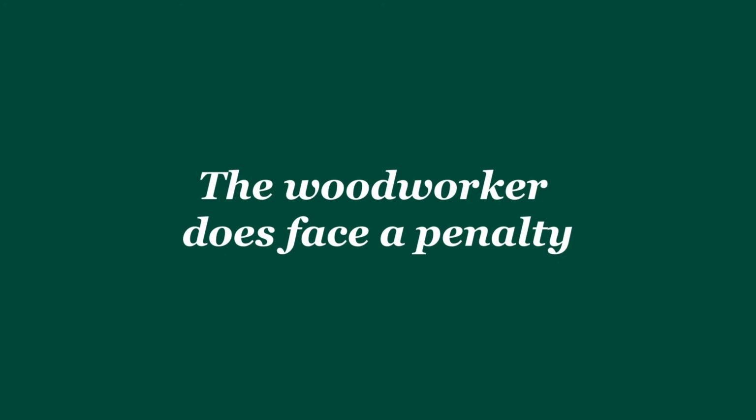The woodworker does face the penalty of being placed on probation for sections for which they did not make corrections, and on their next project, items in the sections noted will be inspected and they are charged all costs for inspection. The third thing you can do is nothing.